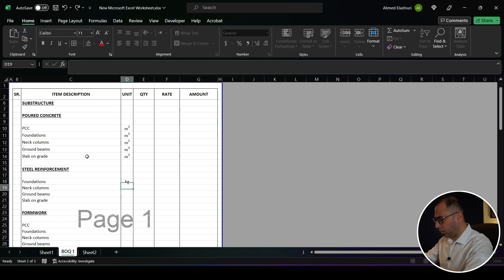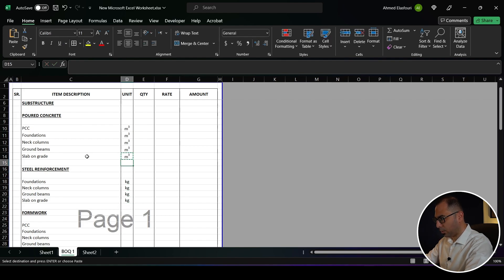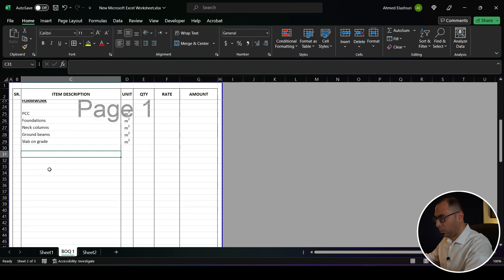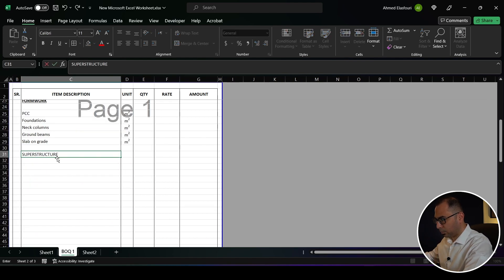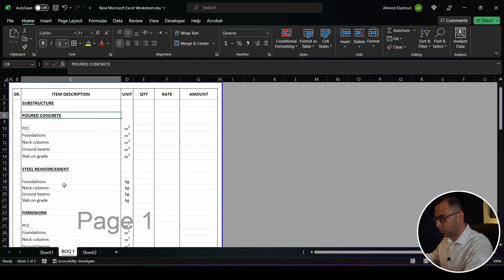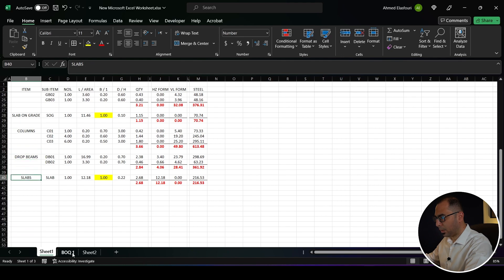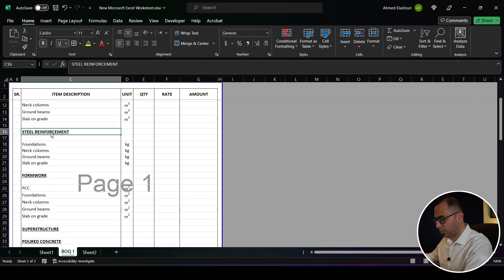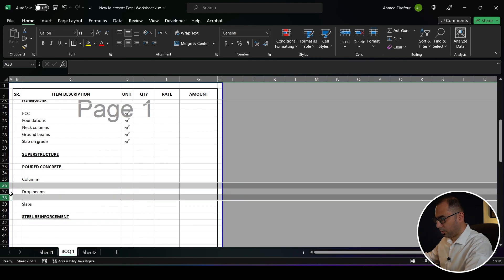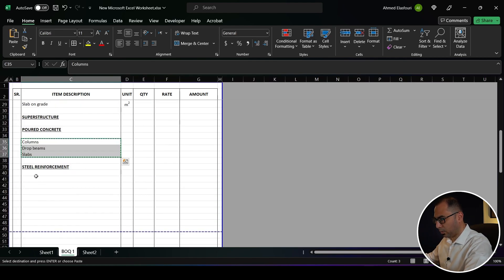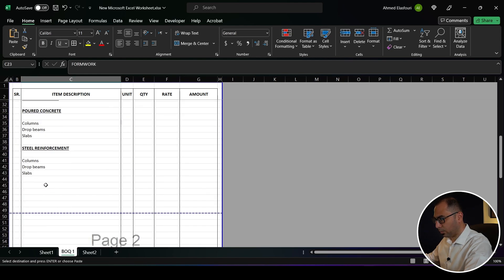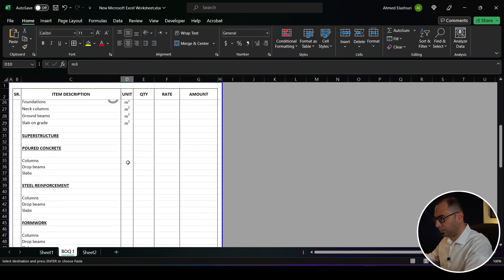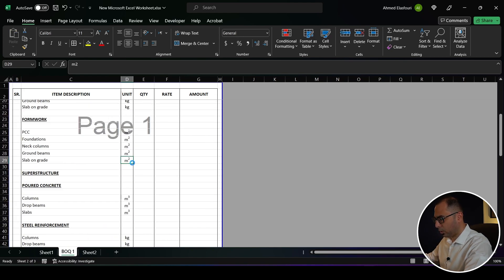Poured concrete is measured in cubic meters, steel reinforcement in kg, and formwork in square meters. That covers my substructure. For the superstructure, I'll have poured concrete for columns, drop beams, and slabs. We also have steel reinforcement for the same items. I'll delete the extra spacing, copy, paste, and add formwork for the same items — again poured concrete in cubic meters, reinforcement in kg, and formwork in square meters.